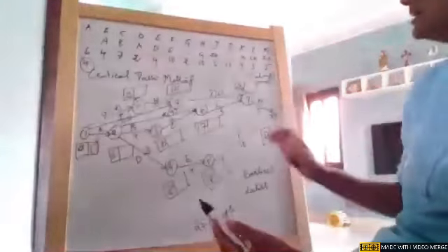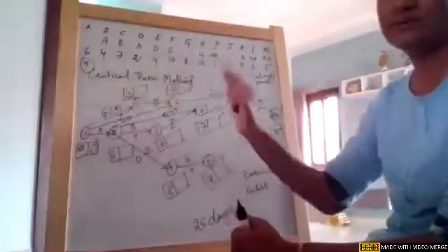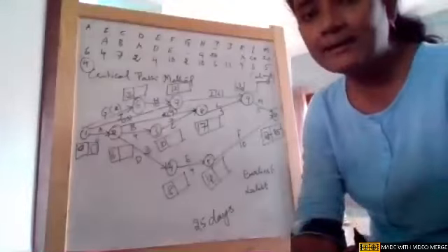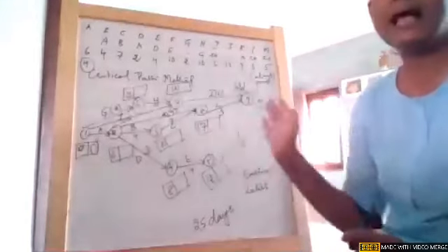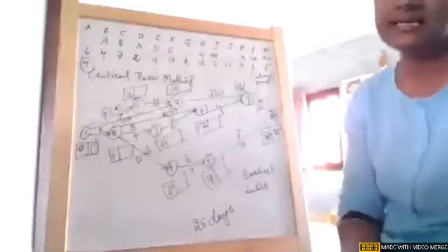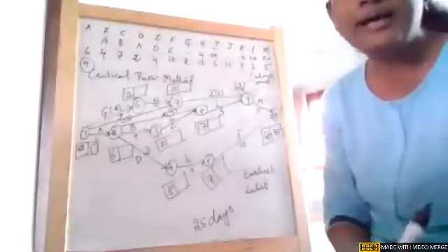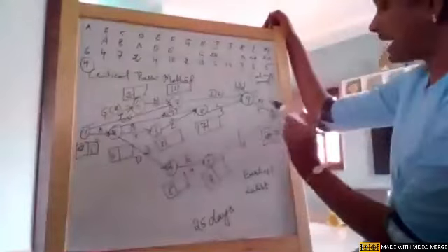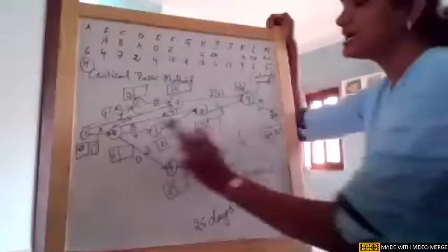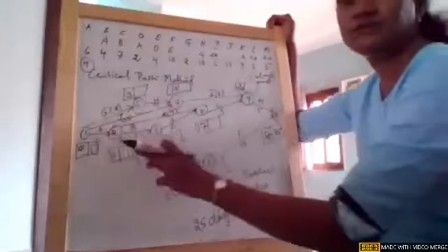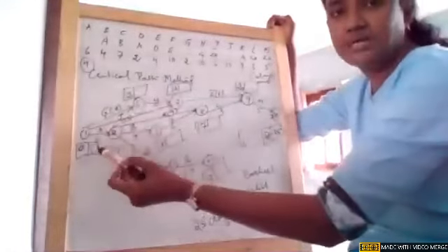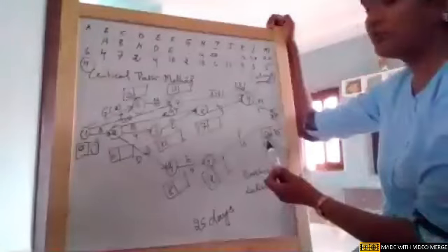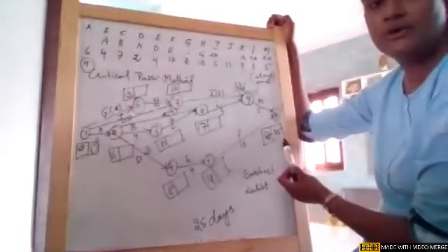So now come back to the latest. While proceeding further, we took arrowheads, right? Now, when I'm going back, I need to consider the tails. Now we need to avoid heads. We need to consider tails. Now, as I told you, the earliest and latest times of the first node and last node will both be the same. Earlier it was 0, so latest is also 0. Earliest we came out to be 25, so the latest is also 25.